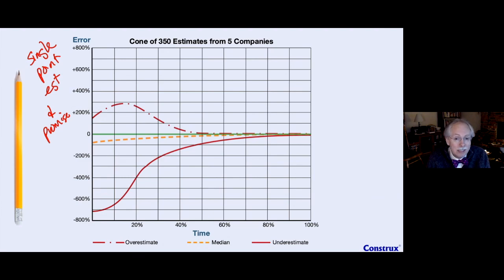Because promise estimates can seem unreasonable. In fact, if you think your promise estimate feels reasonable, especially early in the project, you want to really think about whether you have a promise estimate. Because 2x seems often reasonable for people, when they often overgo 2x and they've lived through it to tell the tale. That's not unreasonable. That's what you normally do. Unreasonable would be 4x or 5x, and you go, well, that's not reasonable. And it's like, okay, we're probably well safely into the promised land. It's not going to feel good here, but maybe by the time we get here, we can actually use it more interestingly.